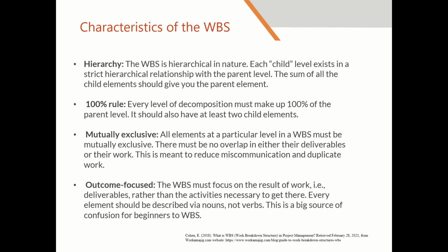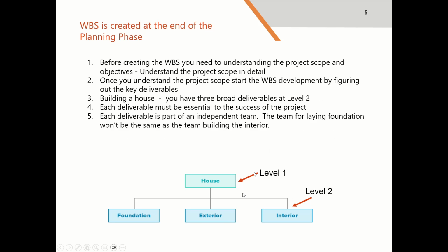The work breakdown structure is outcome focused and focuses on the result of the work rather than the activities necessary to get there. Every element should be described via nouns and not verbs. This is a big source of confusion for beginners in creating work breakdown structures.